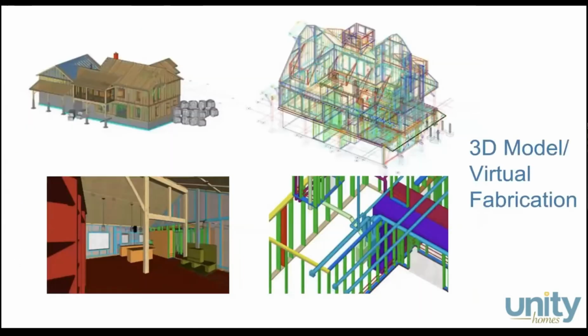Lastly, I'd like to speak briefly about our virtual fabrication process. Once the project is ready, and most all of the details are figured out, we always say the project gets built twice, once in virtual fabrication and then once for real. Virtual fabrication, for those of you that don't know, is the process of defining every stud, every fastener connection, and elaborating the model with all of those details. For us, we typically go into the VFab process after the building permit is received and about 90% of the way through construction documents. Each department that we're working with internally has an extensive QC checklist that reviews the virtual build before we go into production.